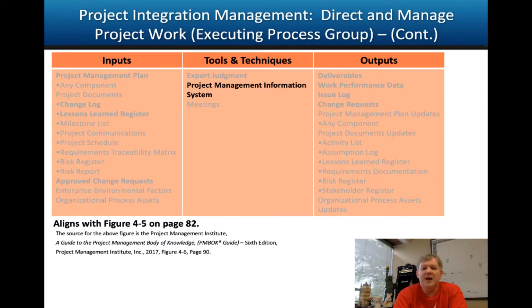And then your PMIS, or Project Management Information System, this could be something like SharePoint or a wiki page or some sort of an information sharing system where it gets pushed out to people per the rules, or people can push things up to it, and then people know where to go look for various project-related information in the system.